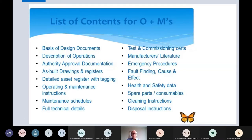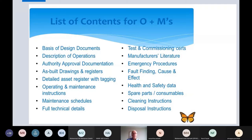What you and professionals like you need at the end of a project is at least this amount of information for a well-managed operating and maintenance manual. These are headings, but behind all of these on a typical project there are many thousands of documents that need to be put together. They need to be accurate, accessible, and capable of being kept up to date. But it's rarely that all of this information is handed over, and it's rarely that it's handed over correctly.